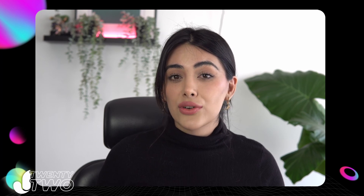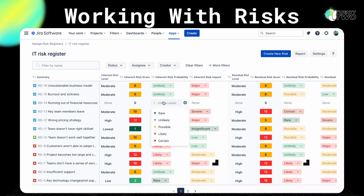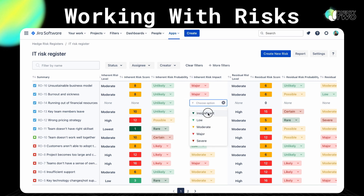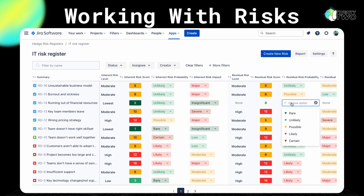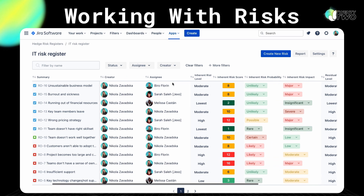We talked about all the steps you need to follow to assess risk in a project — from the likelihood of it happening, the impact it might have, and how the response of your team should be. The amazing thing is that Hedge allows you to handle all of this with ease, providing you with a drop-down menu that allows you to choose the probability of a risk happening and its impact. Both of these variables will give you a score that will help you prioritize your risk.